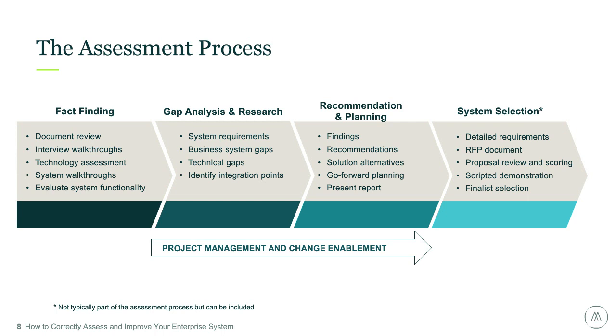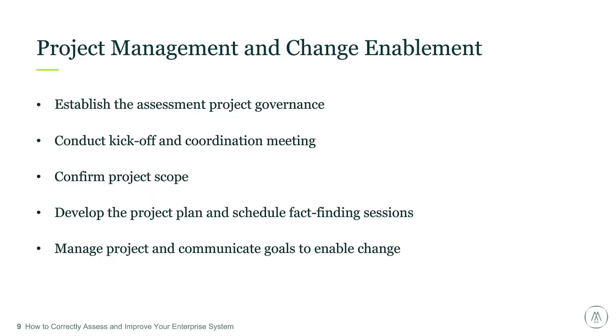Let's briefly discuss each of these phases, starting with the foundation. Project management and change enablement is the foundation of a good assessment process. Once you've decided to embark on an assessment, first you want to establish the project governance. And by that, I mean the project steering committee and the project core team. The core team should include the key process owners you need to interface with in assessing the problem, and also the vendor solution consultant who would help drive the potential solutions.